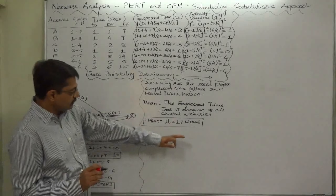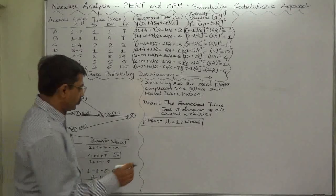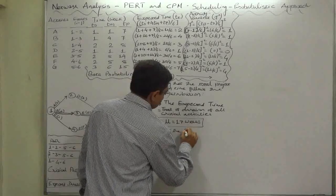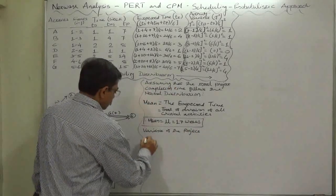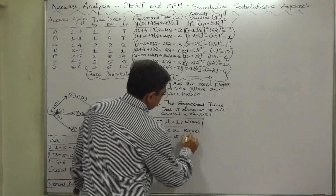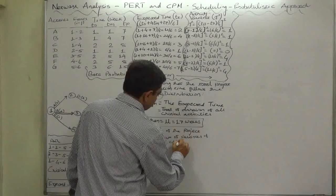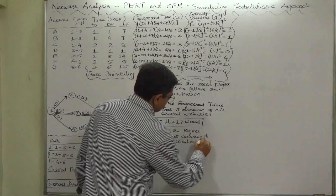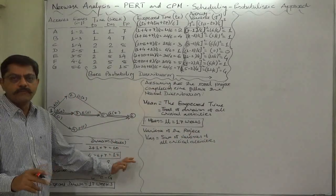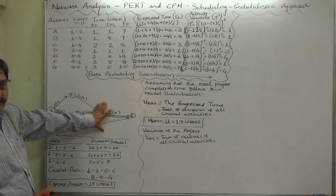To have the value of standard deviation, first of all we have to calculate the variance of the project. The variance will be the sum of variances of all critical activities. This is also only possible if we determine the critical path and recognize the critical activities from the network.